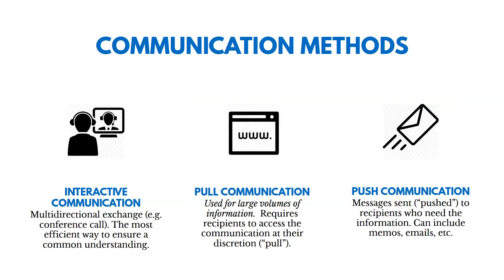Another tool and technique of planning communications management is communication methods. There are a few different types. Interactive is multi-directional communication and is the most efficient way to achieve understanding — for example, a conference call where stakeholders can share information and immediately ask questions, ensuring common understanding. There's also pull communication: we share project reports on a website, and stakeholders pull down that information when they need it.